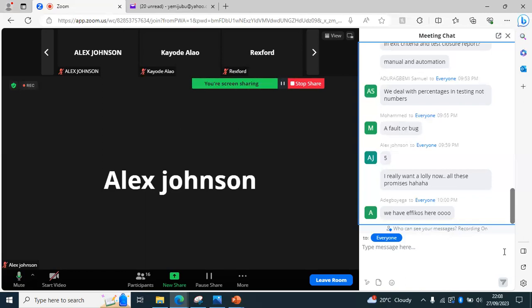And we've got some that may use terminology like mandatory. When they use the word mandatory, it is compulsory. They know that there's a reason it's compulsory. And you might even be reading through the requirement and see that this requirement is meant to be mandatory. You can discuss with the business analyst to say, don't you think there's a risk in this one? If we don't test the payment platform properly, there are consequences. So the one you're putting as a nice to have, it shouldn't be. Don't you think it shouldn't be?